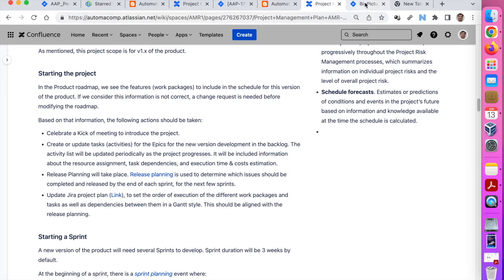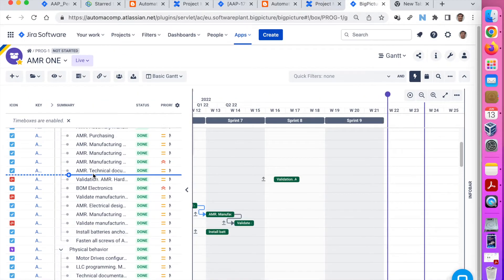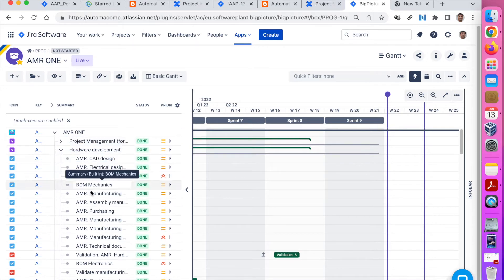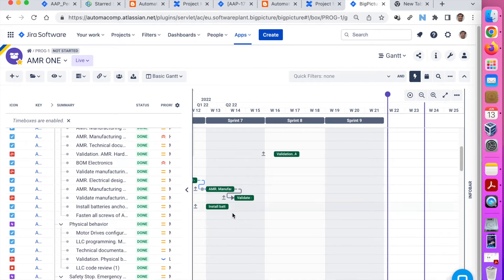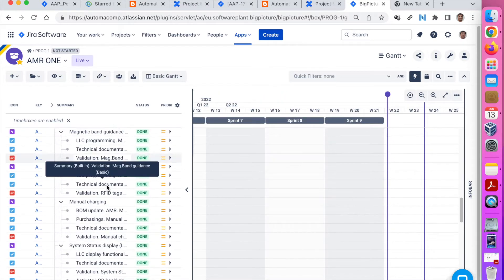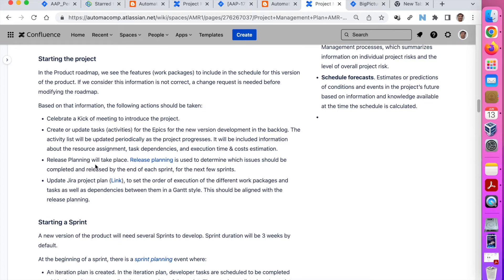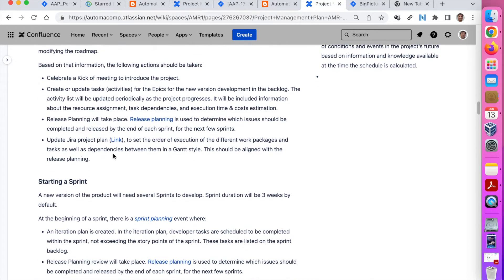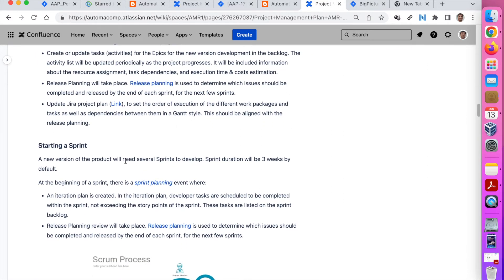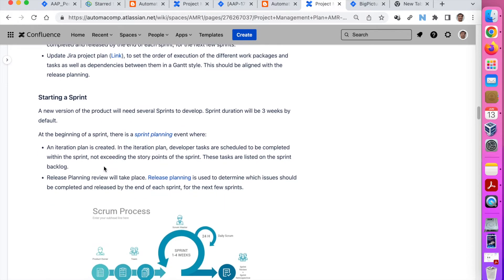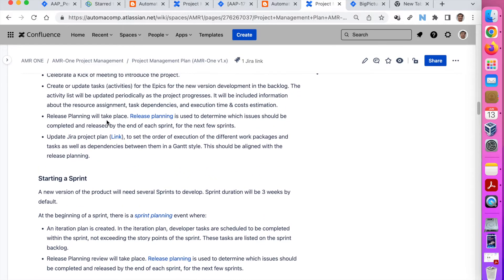From the work breakdown structure, we end up splitting the different epics into tasks. We can estimate when we are going to do that, because we define the sprints and when these different tasks will happen. This is the release planning. I personally use Jira, but you could use whatever you want. I have a Gantt-style plan because I like it — it gives me more visibility than just having a backlog and knowing what we are going to do in the next sprint. With this I can plan many weeks in advance.